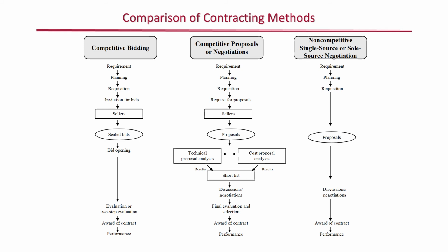Whereas RFPs, or request for proposals, you know you want to go from point A to point B, but you don't know how to get there, thus you're requesting proposals because there are many different ways to get you there. Fly you by plane, rent a car, train, bus. So as sellers provide proposals and technical ways to get you to point B, you have to balance cost or pricing offered, technical ability, and the quality of the service vis-a-vis your requirements to get there.